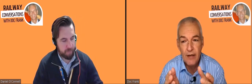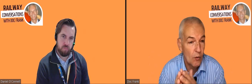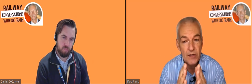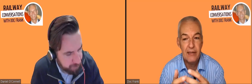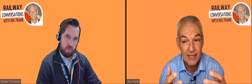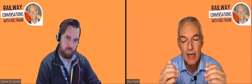Yeah. So if you have a test that would normally take 3 days, but hey, you only have 3 hours because, whatever, the software was delivered late or what have you, how can you focus on the task that really could lead to the biggest impact, the biggest hazard? And with trains colliding, there are only so many train paths where there's actually a possibility that trains can run into each other. More often than not, trains just run in parallel and there's no real issue.